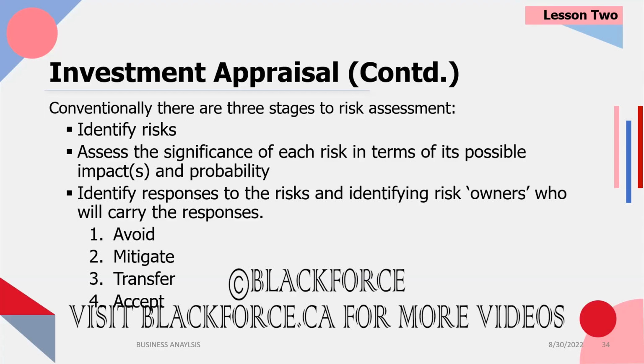Some of the ways that risk are responded to are, so one is to avoid it. Do everything you can to avoid it. Start change management early so that people are not worried they're going to lose their job and they start boycotting the new system. Okay? Sorry, that's actually mitigate. So we have avoid, mitigate, transfer, and accept it.